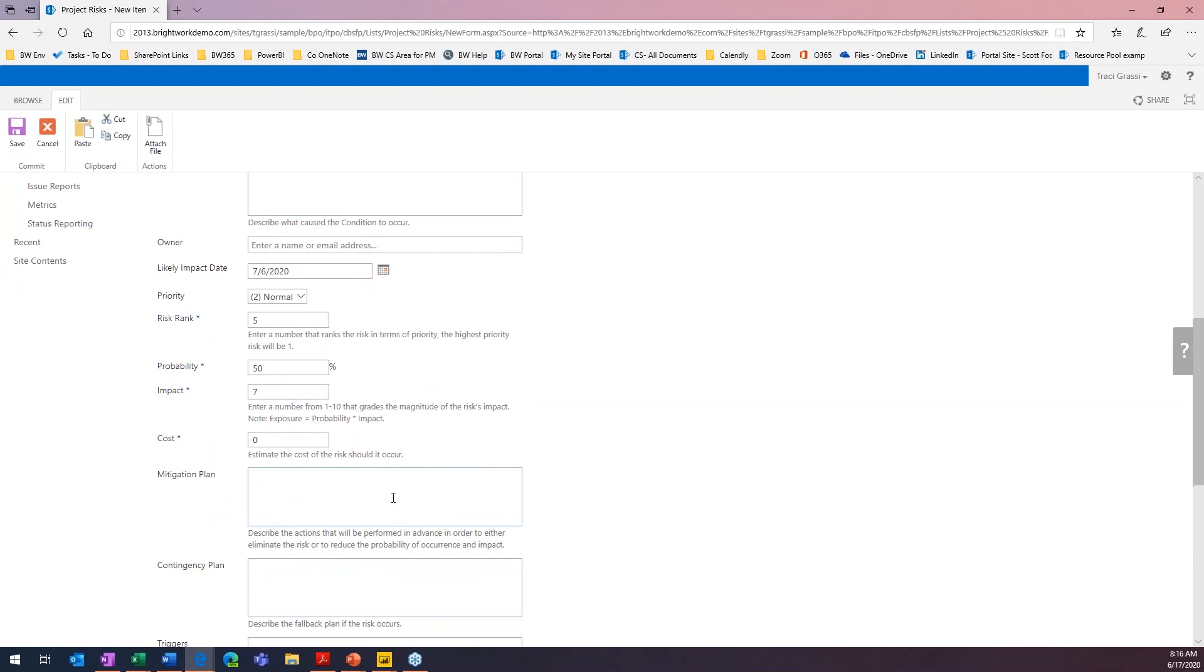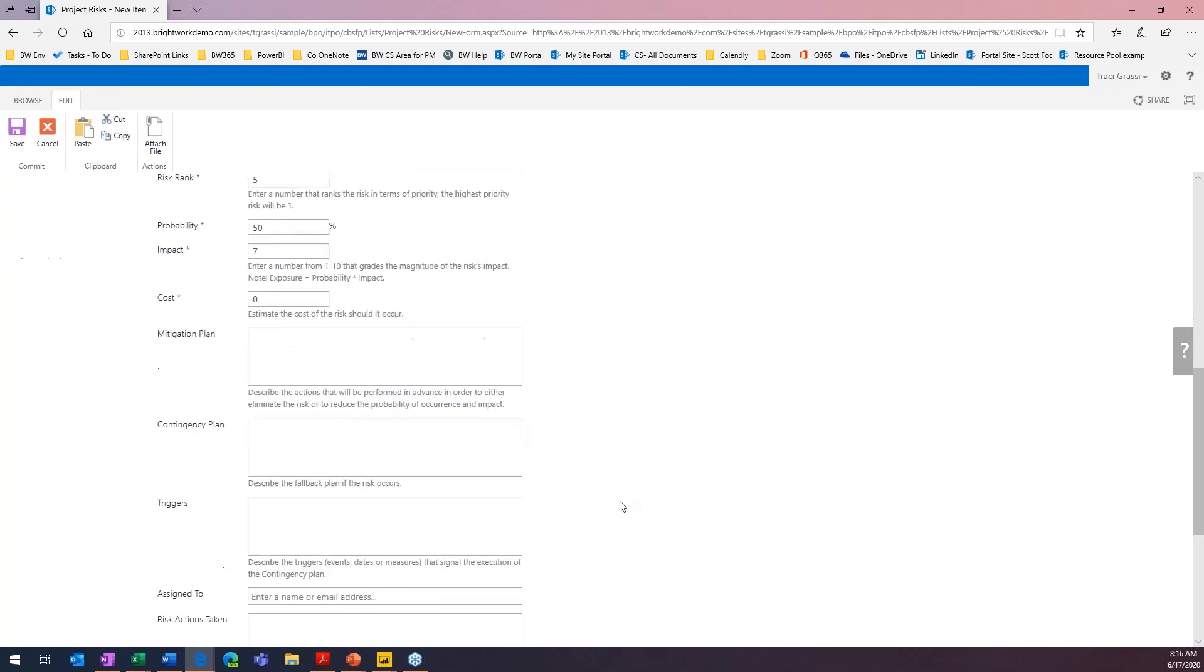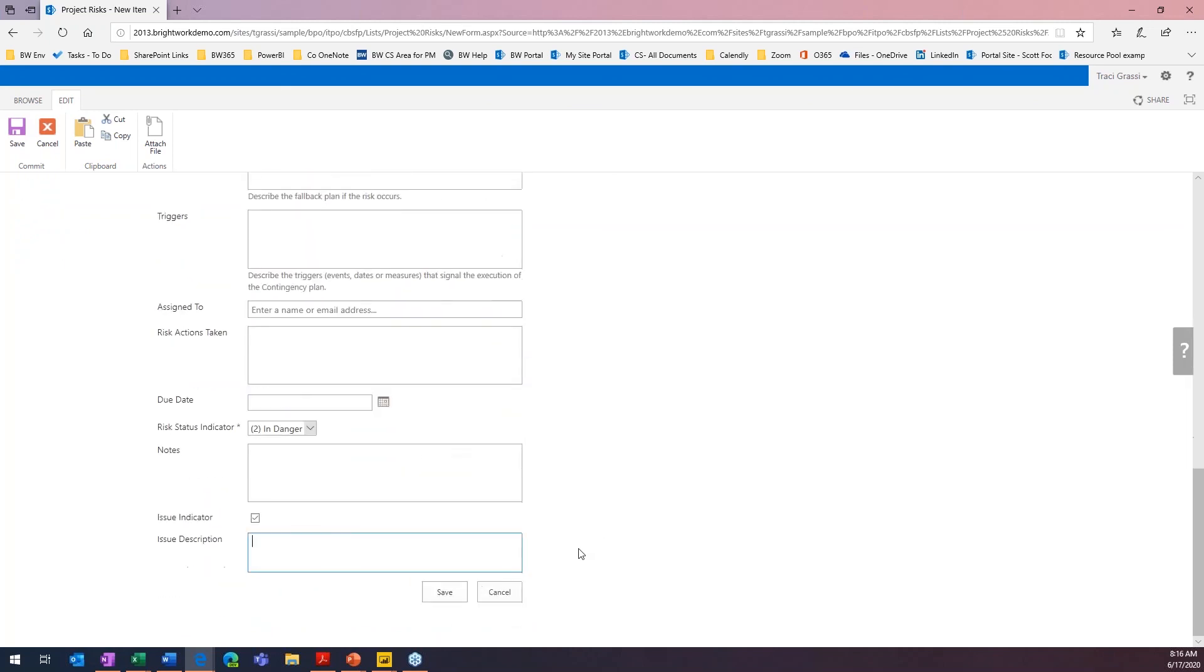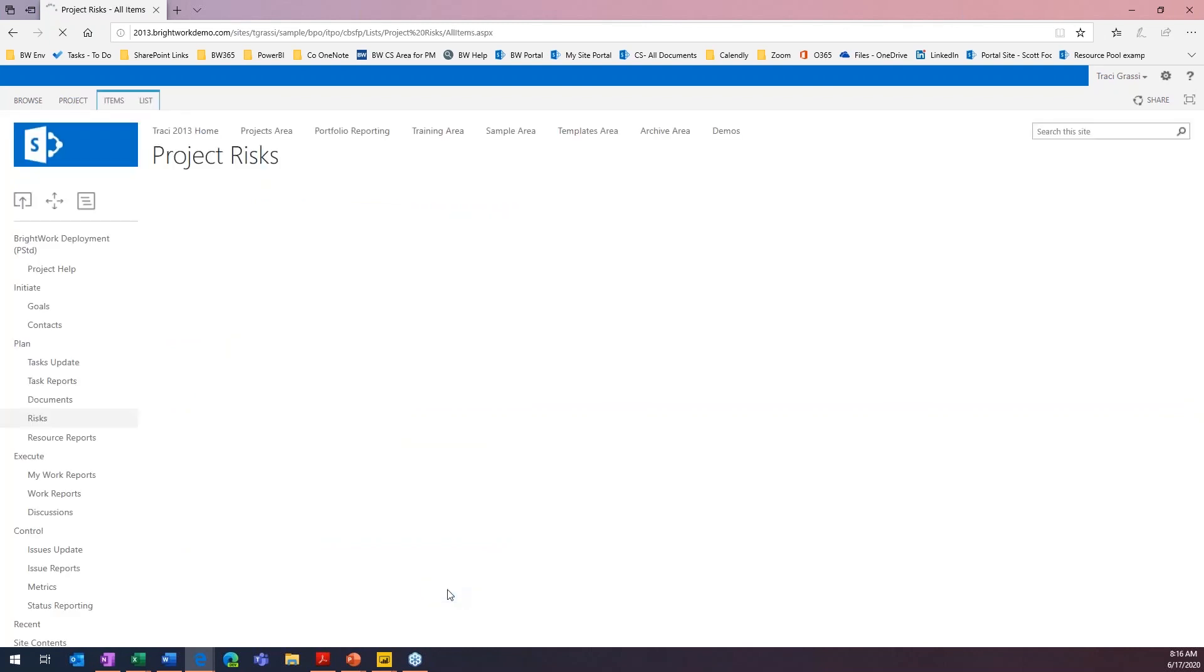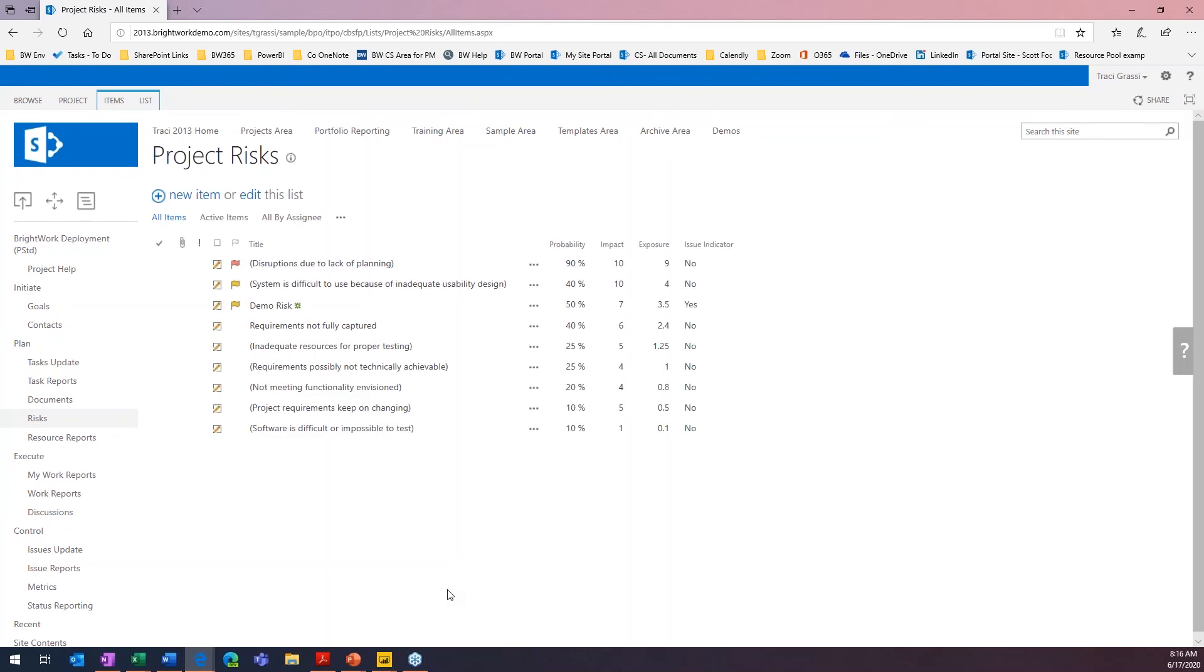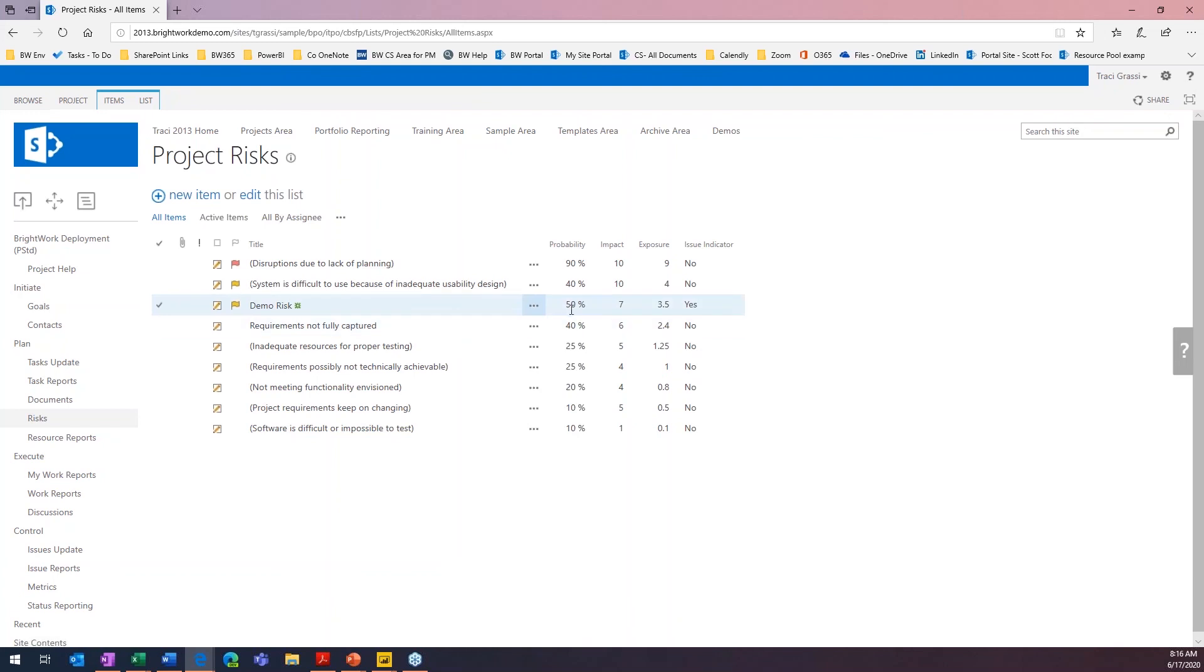So, now you're going to notice that we're going to get an impact score based on my probability and based on my impact. Let's go ahead and save that and we'll see our rank there as well. So, here's our demo risk. We've put it as in danger, so it's come up to the top. We've put it at a 50% probability. The impact is going to be a 7, so it gives it an exposure of 3.5.